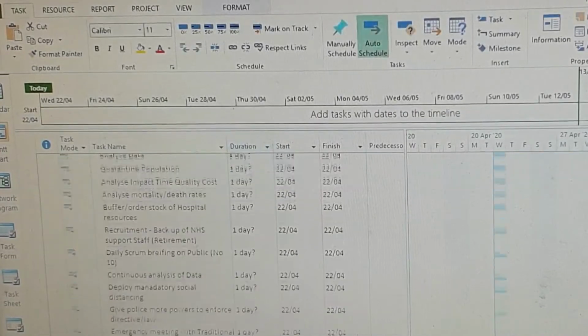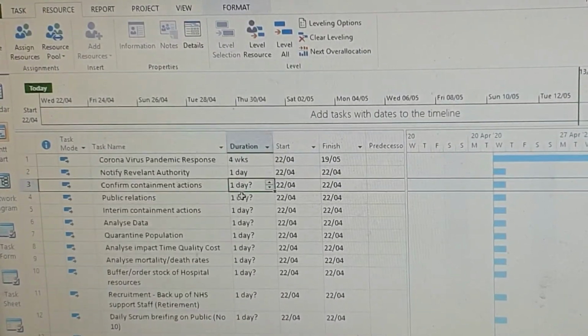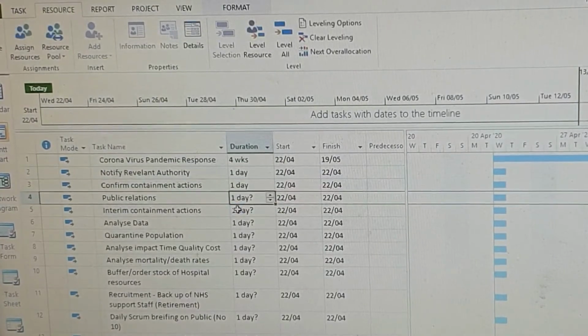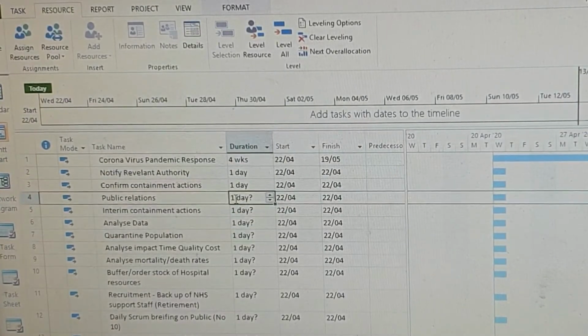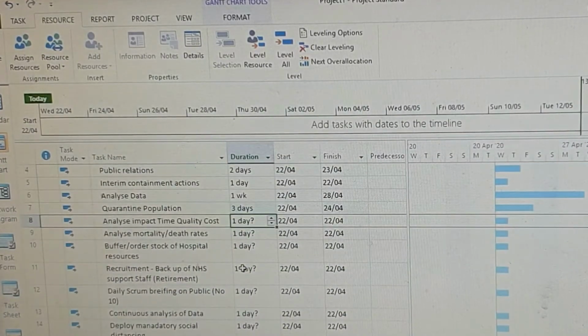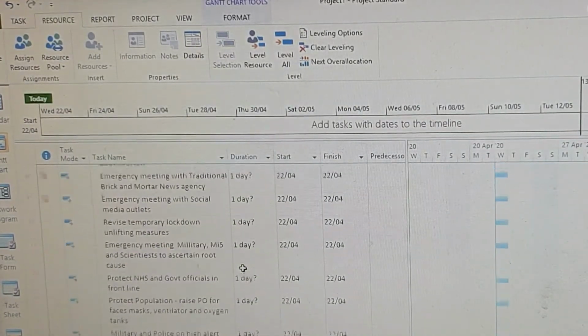You can start to affix dates to each of the subtasks, but it is advisable to start doing it after you have finished planning each of the subtasks sequentially, or in the right order.